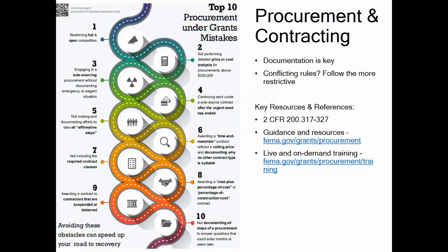State government applicants must follow the same policies and procedures they would use for procurements with non-federal funds. They must comply with 2 CFR 200.322, procurement of recovered materials, and ensure that every purchase order or contract includes any clauses required by 2 CFR 200.326, contract provisions.